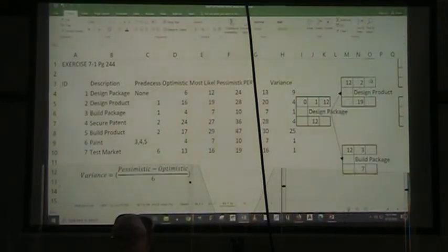All right, so I come up here, I know that my early finish time is going to be equal to my early start time plus my duration, right? And that is going to be the same for both activities 2 and 3. The way we calculate it, not the number.